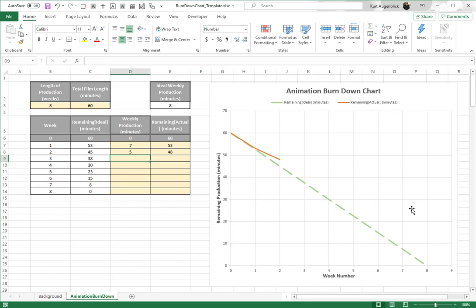Now notice they're trending so that they're not going to finish on time, right? They're going to move the line out. The line should pierce here at 8, but now they're trending bad. If they continue to trend bad, at this point, you know there's 44 minutes to go, and in reality, they should have been down here on the chart.